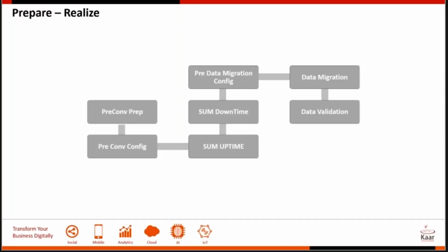So custom code is adjusted for SAP S/4HANA in dev. Typically, it is fixed in dev and then tested in the QAs. And then you could use the same transports to be moved into the mock instances. But there are customers who prefer to do it in the sandbox, and then you can use those to move it into development and possibly change the ownership on those objects. This actually helped save us a considerable effort when we executed this conversion for one of the high-tech industries in Ohio recently. Finally, end-user testing is also part of the realize phase, and then you step into the deploy phase.